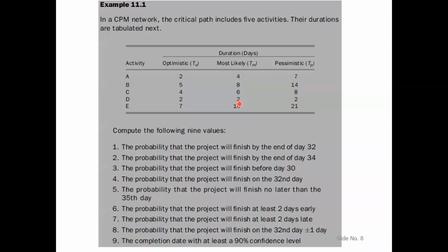So that is also one of the things which we can do. But in this case, we are using another method which is called PERT. Okay. So in this PERT approach, we can also deal with this type of situation. So in this case, although we can say that the normal duration for this project will be 30 days, the project can finish in other than 30 days as well, maybe less than 30 days or maybe more than 30 days.